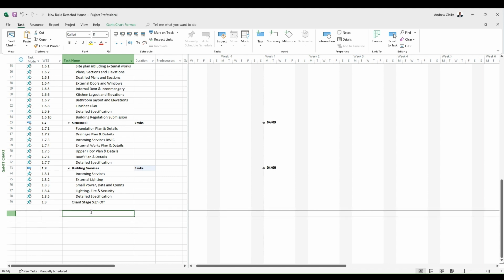Once you've got all that information, we'll put that together, assemble your employer's requirements, or prepare a tender document, if you will, so you can get it out to the market, get it out to a few builders, and get a few quotes coming back in. Or you could even, if you were self-building or you just wanted to manage it, go out and get the relevant packages. But for the purpose of this, we'll stick with the builder route.